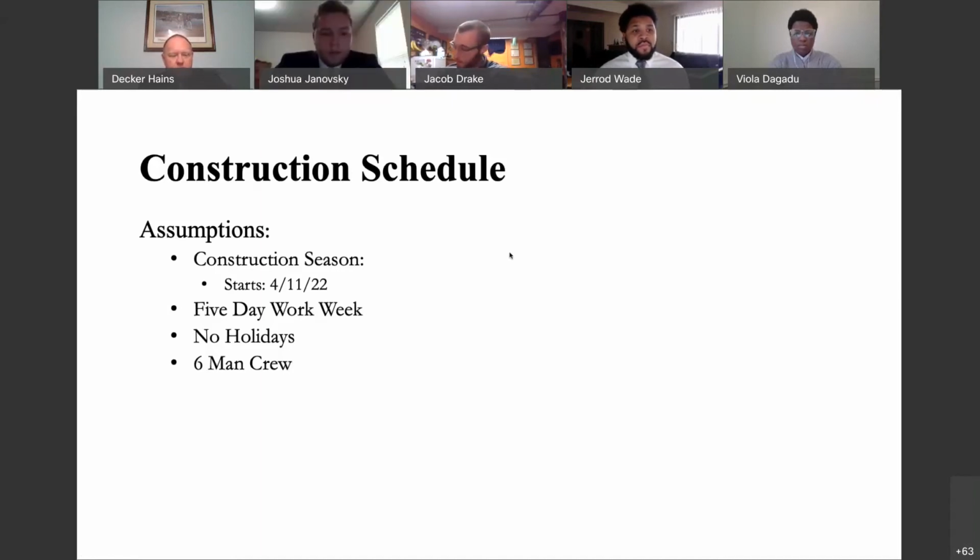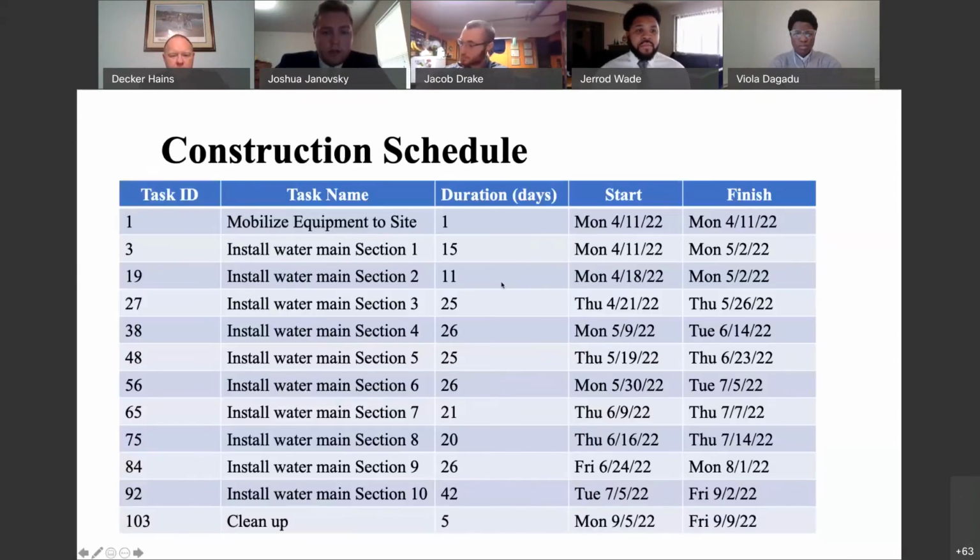Thanks, Jake. So on the next slide, it shows our construction schedule, and some key things to note is that we divided the project into 10 different sections, so that when crews finish one section and they're waiting for chlorination, they can begin trenching another section. Another thing to note for this project is that it starts in April and runs all the way till September.